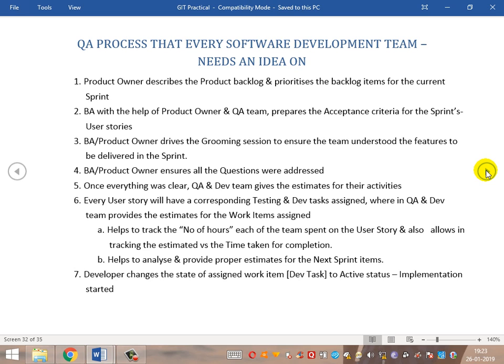Once everything is clear, QA and the dev team give their estimates for activities corresponding to the tasks. This helps in tracking the number of hours estimated versus actual time taken for the completion of user stories, allowing analysis of the difference between actual and estimated. This also helps in analyzing velocity — the speed at which user stories have been developed, implemented, and tested — which helps in planning the velocity for the next sprint.